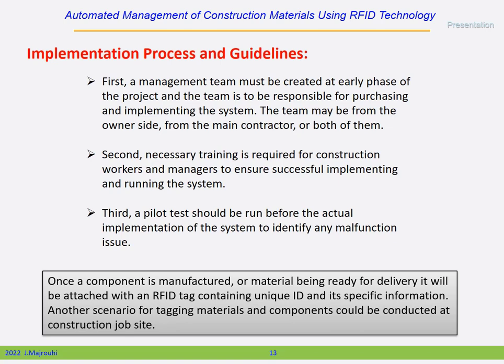Once a component is manufactured or material is ready for delivery, it will be attached with an RFID tag containing unique ID and its specific information. Another scenario for tagging materials and components could be conducted at construction job site.